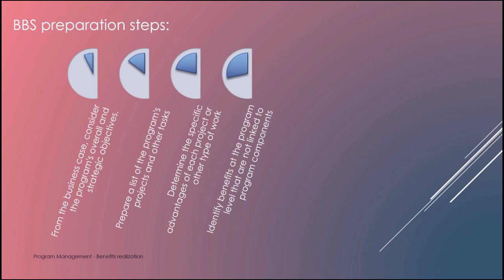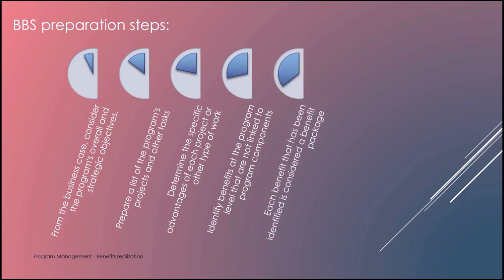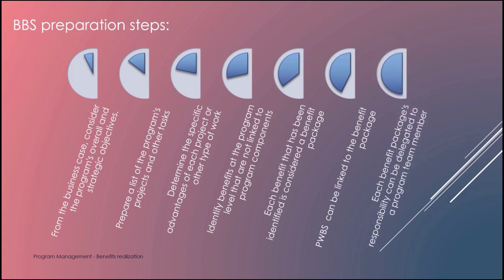5. Each benefit that has been identified is considered a benefit package. 6. The PWBS, that is the program work breakdown structure, can be linked to the benefit package. 7. Each benefit package's responsibility can, and should, be delegated to a program team member.